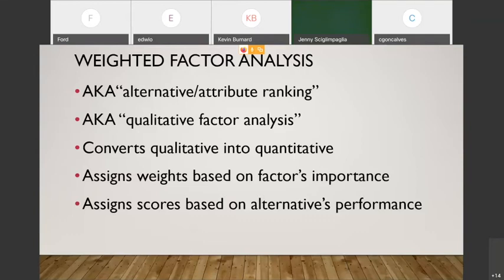What's different is if your ratings or scores are on a scale to 10, the highest possible score is 10. If you're rating on a scale of 1 to 100, then the highest possible score is 100, which means somebody like supplier B scores 100 on everything. And then when you multiply by the weights, it still equals a total of 100. I have performed the calculation for supplier A, 10 times 0.25 plus 8 times 0.23 plus 4 times 0.18, etc., gives us a score of 6.98.